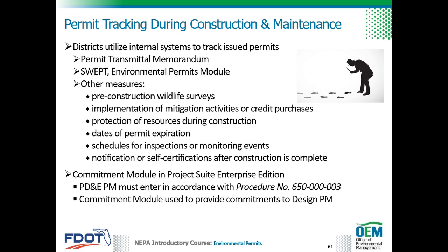Spreadsheets and/or databases may be helpful, especially when the tracking tools automatically notify the user of upcoming dates and scheduled events. A commitment module in Project Suite Enterprise Edition has been created to document, transmit, and track all commitments established as a result of the PD&E study and/or agency coordination.